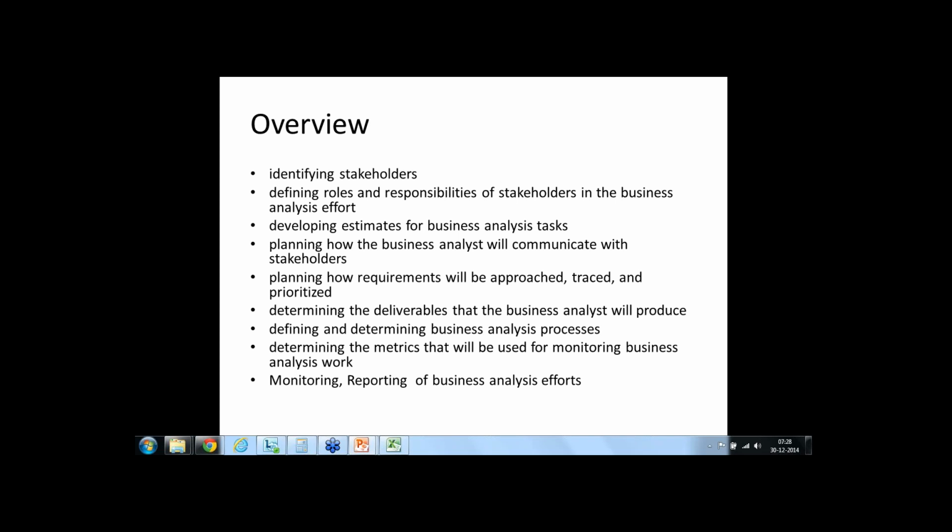And at any stage, all the clarifications need to be documented so that your stakeholders never go back on what they have committed. There are tools available in the market to communicate your minutes. I hope you all are aware of minutes. At a very high level, they will have information like the points discussed in the session, who confirmed that, who attended, and the date and venue. You can use an Excel, and for arranging the meeting you can use meeting tools like those available in Outlook, Gmail, or whatever.